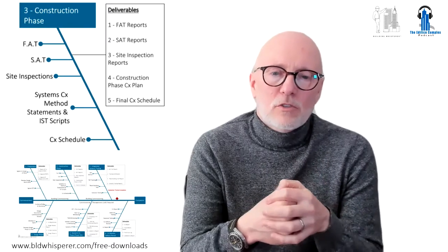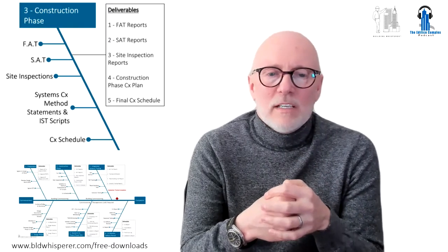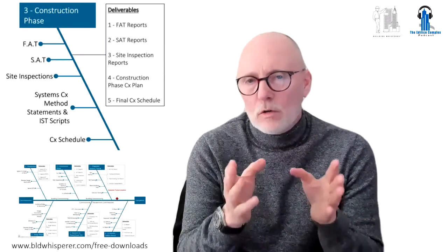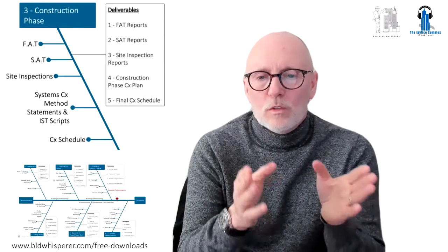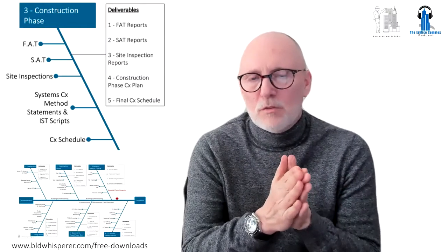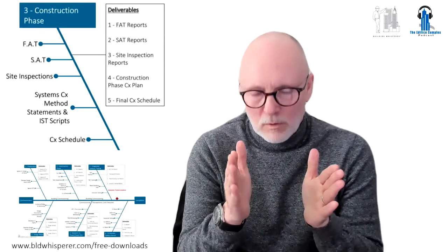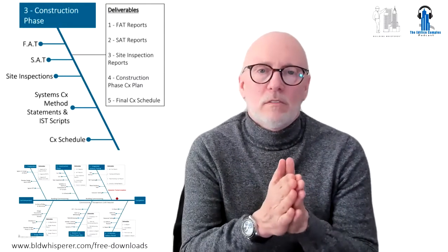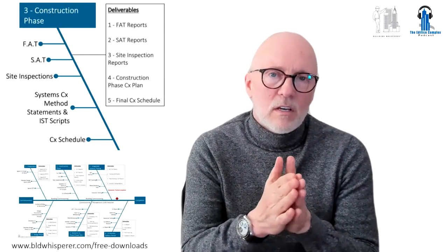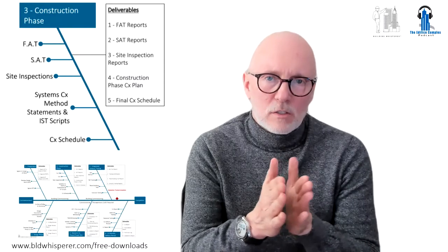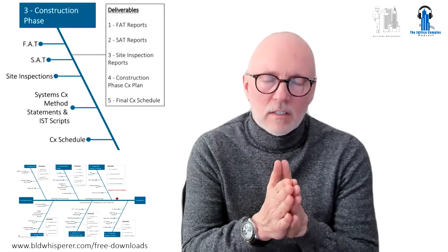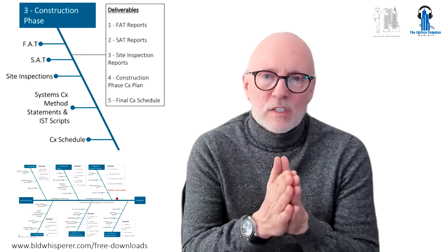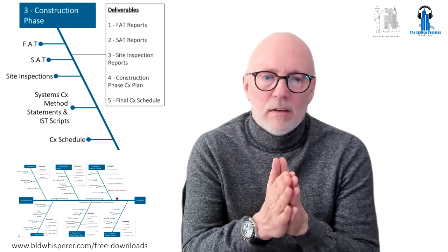The completion of the construction phase is really construction up to but not including power on. This is called static completion. If the system is fully installed and just prior to power on, that is called static completion. That is a milestone in that system's evolution from design to construction to commissioning to handover. So static completion, again, is the 100% completion of installation prior to power on. That's it.